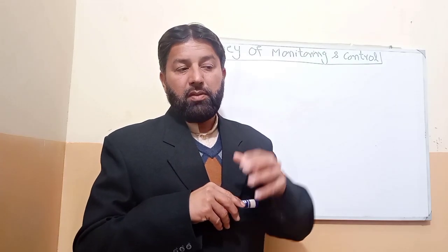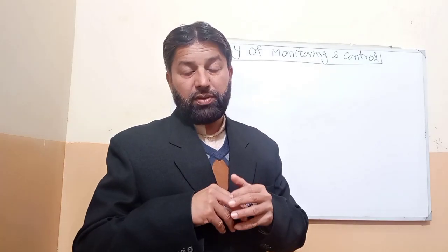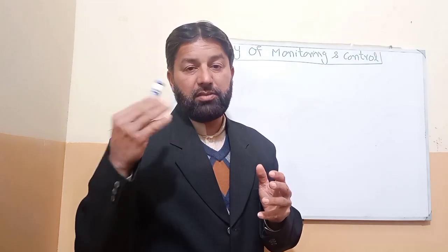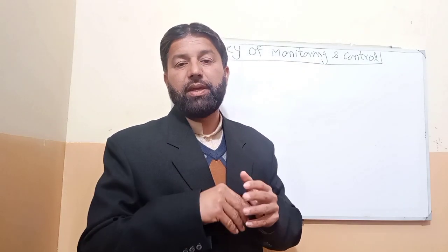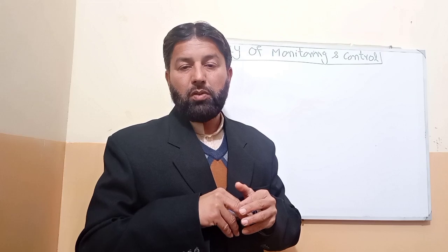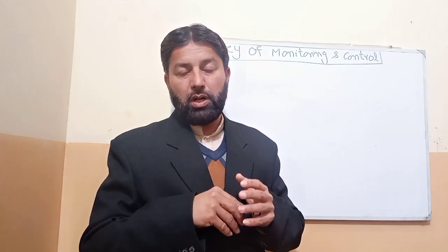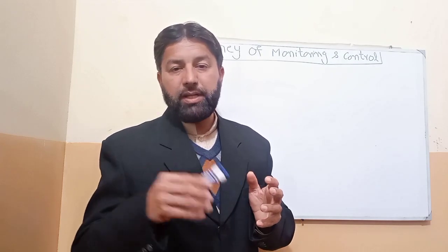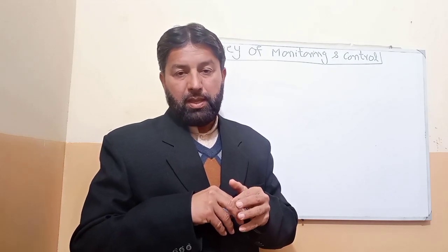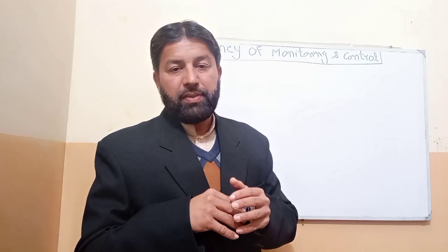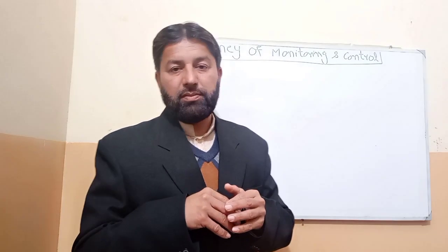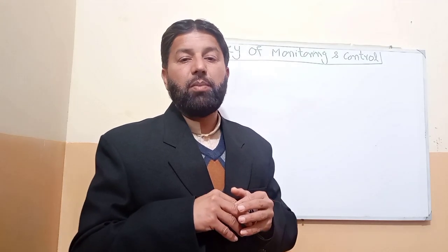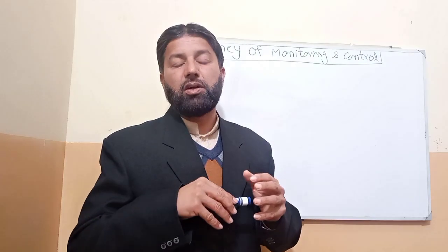And also when we are checking the risk, if a risk has occurred, it does not remain a risk, it is an issue. We need to review the issue log, manage the issue log, and update the issue log, and we combine the lessons learned and all these things. This is all about monitoring and control.